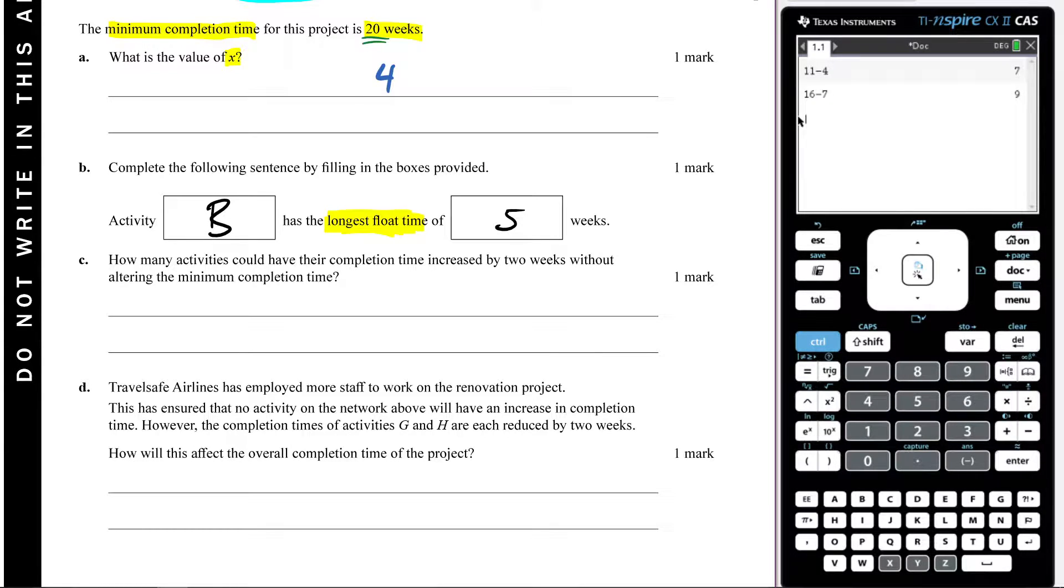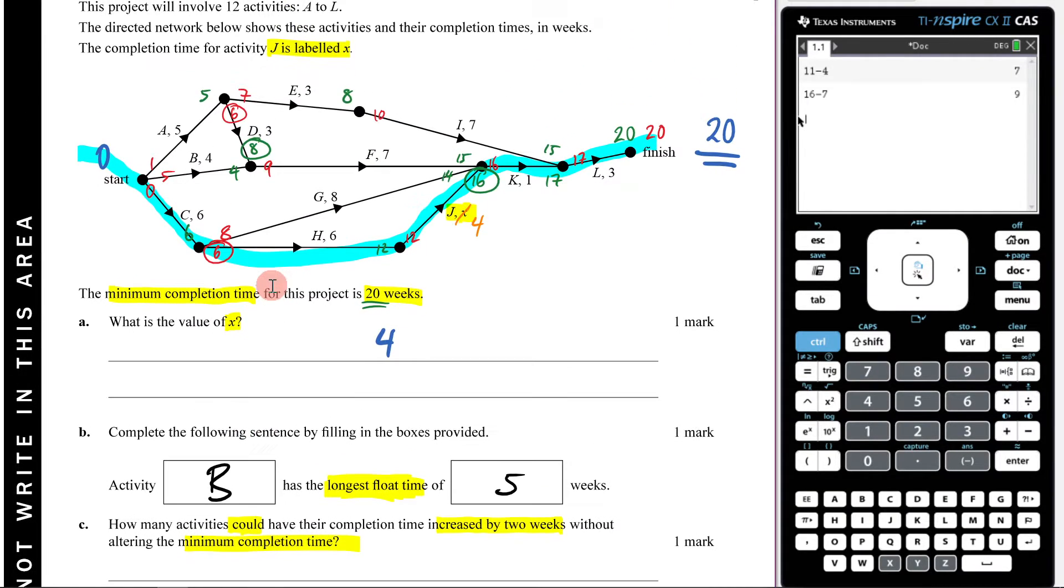Alright, we're now going to answer part C here. It says, how many activities could have their completion time increased by two weeks without altering the minimum completion time? So really what this is asking us is how many of these have a float time of two or greater that I could bump it up by without creating a new critical path.